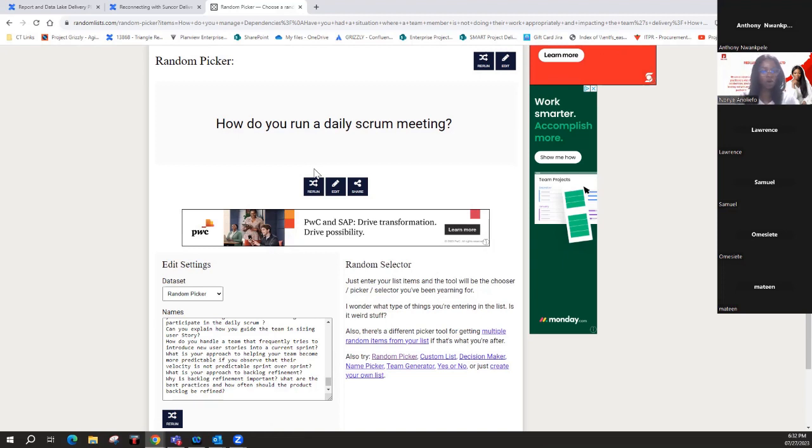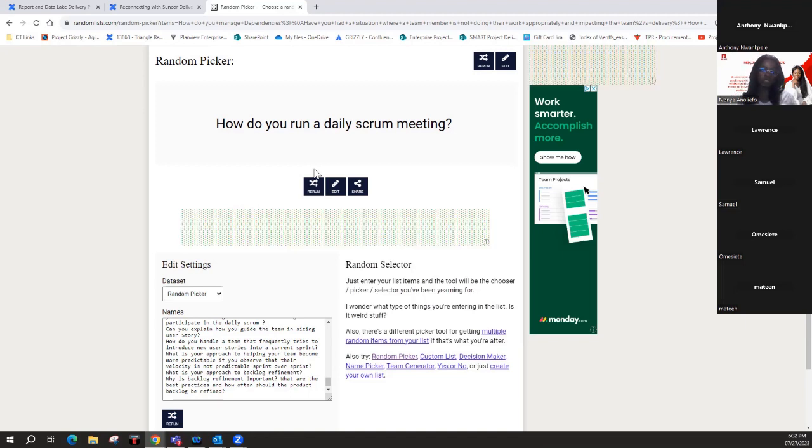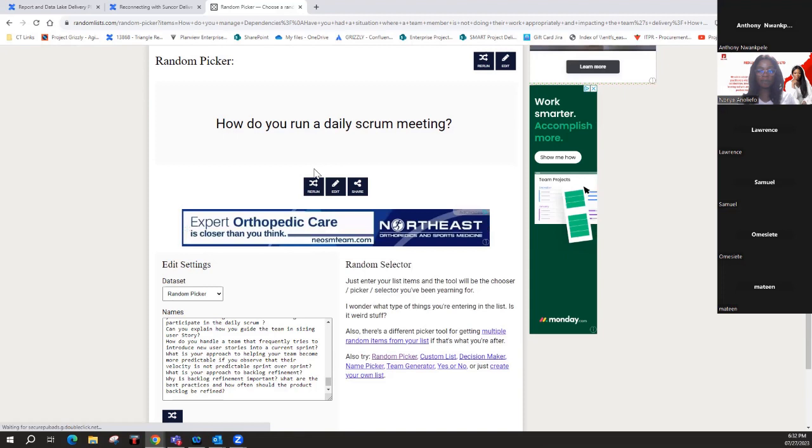So what I do is I call on the first person to provide their updates. I also encourage them to think about the approach of: what did I do yesterday? What am I going to do today? And impediments. I don't really expect them to answer in that particular manner, but I just remind them so that they can use that to keep their answers succinct and short, right? Because we only have 15 minutes.